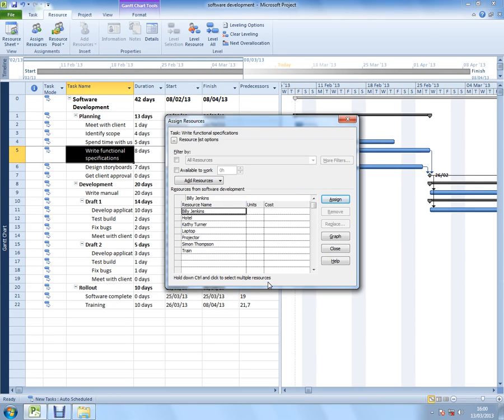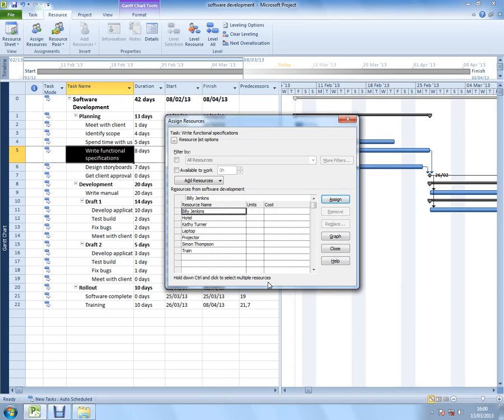They changed a few bits in Project 2010, switching off effort-driven by default. That's not to say it's switched off on yours - that is the default setting. It depends what IT or previous users or yourself have done in the past. As it is a setting we can change. Once again, it's another tutorial outside of this, but for now, at the moment of assigning, that message is very key.